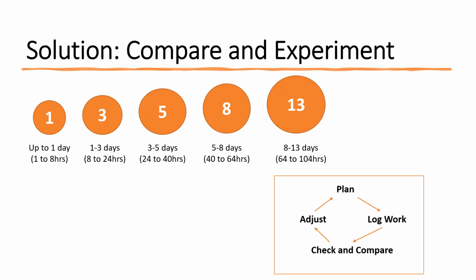where it varies obviously between teams. One team might find that they're productive 6.5 hours of the day due to meetings. Another team might find that they're productive 5 hours of the day. So are these days based on that? They're not actually calendar days.